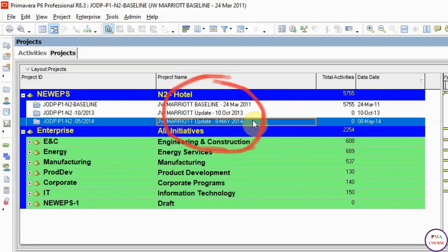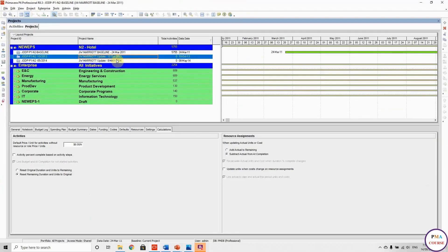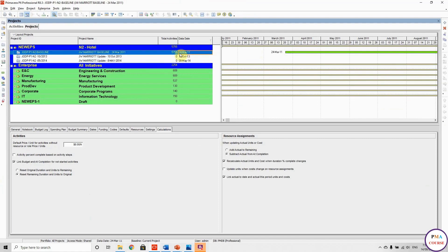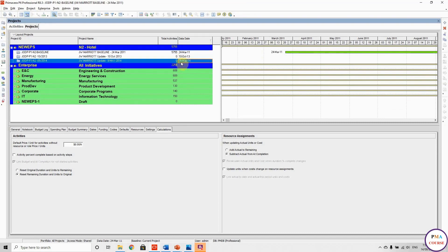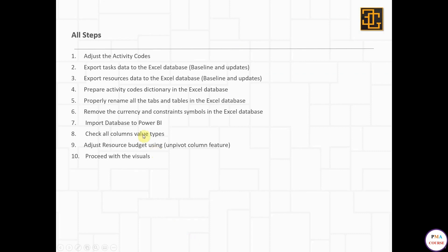The October 2013 update is one I picked between the baseline and the last update. The start date is 24th of March 2011, and 8th of May was the last update date. We will compare the May 2014 update to the October 2013 update to see the trend and the progress.